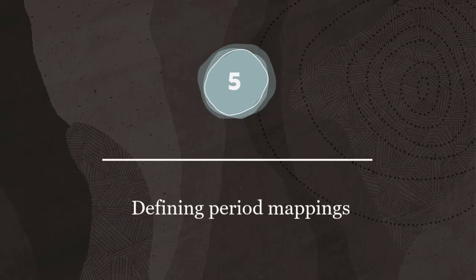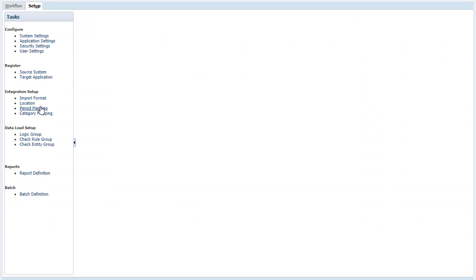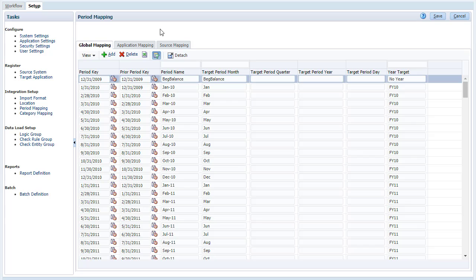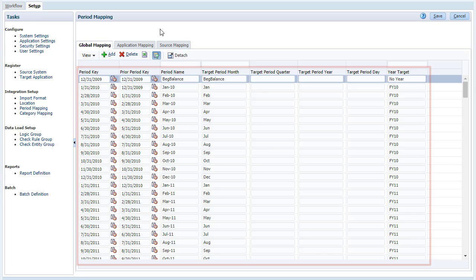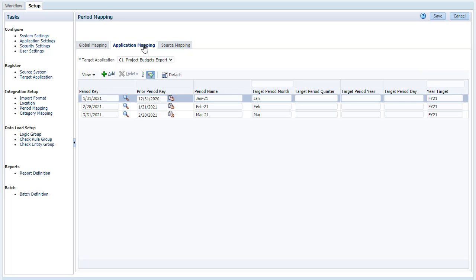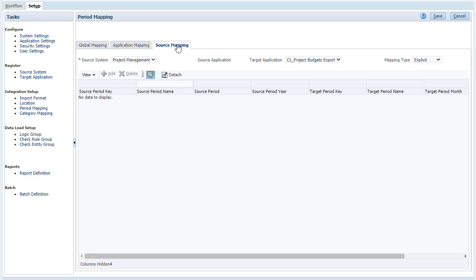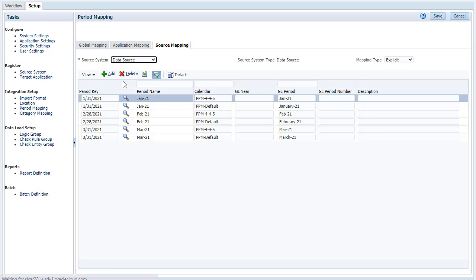Step 5: defining period mappings. Period mappings define the mapping between Project Management calendars and the EPM Planning application year or periods. You use default period processing when EPM Planning and Project Management use consistent period definitions and period naming. You use explicit period processing when EPM Planning and Project Management period definition or period naming conventions are different. Add your period mappings to the Project Budgets export target application. Source mappings are required to create period mappings between actuals and budgets. If you have initialized separate integrations to accommodate multiple accounting calendars in Project Management, you must define source period mappings for each of the integration definitions.